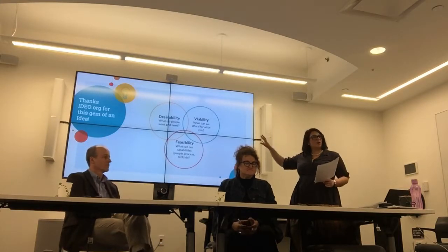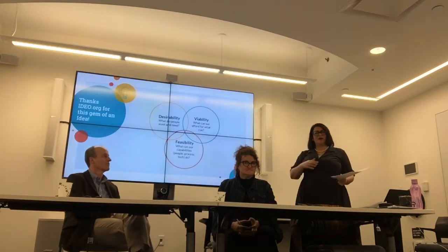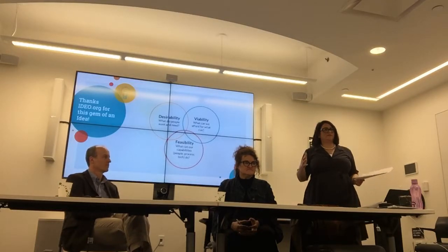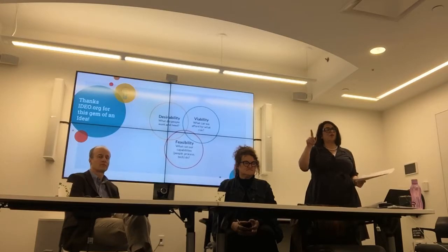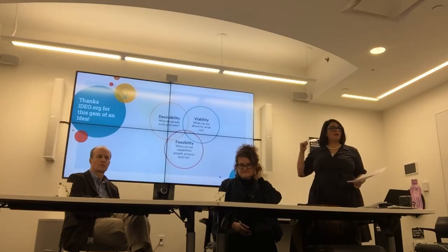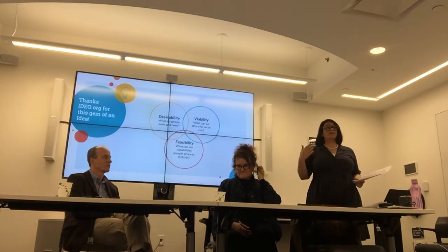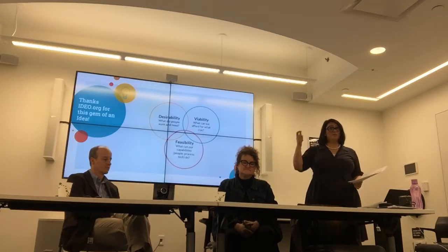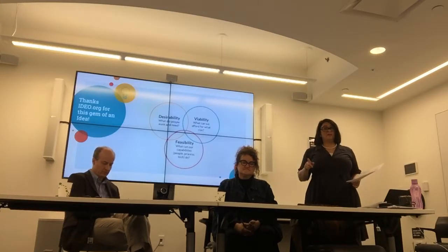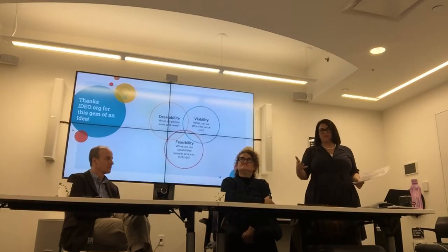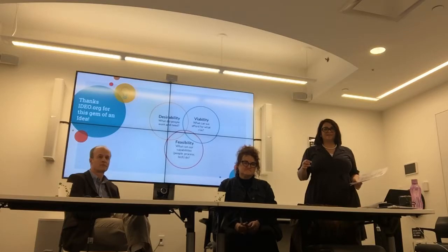All of those hot pink post-it notes on the wall, the pain points? I said, right, vendors, these are our pain points. The winner is the one who can build me a working prototype in 4 weeks to address as many of those pain points as possible. I'm going to run a series of experiments to test whether we can improve access to justice by removing those pain points. That's our aim. By the way, you have to run the pilot for roughly 3 months. Total tech cost, $100,000. We got some really creative insights by doing that.